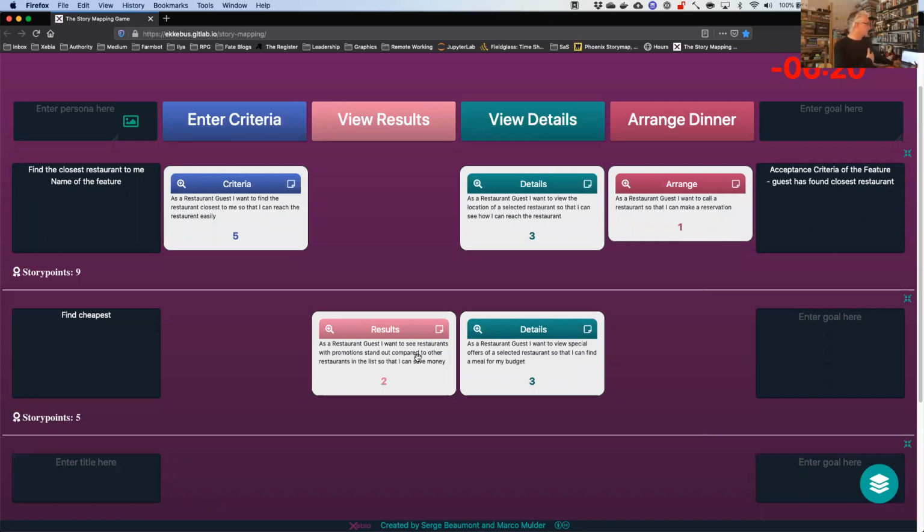Stories first or epics first? My answer would be, actually, it could be both, because this is just a structural view, but the more common case tends to be epic first and you break it down. That's actually better, because then you always know towards which goal you are working.